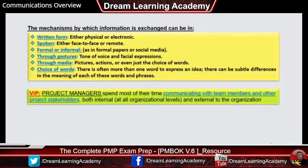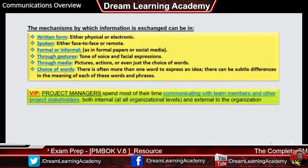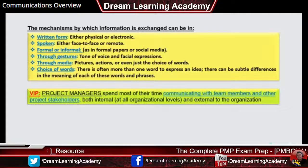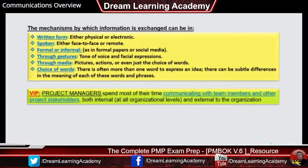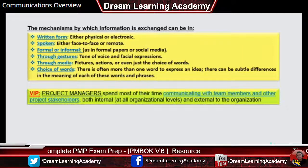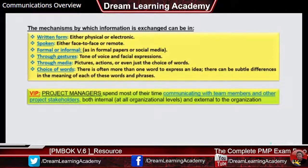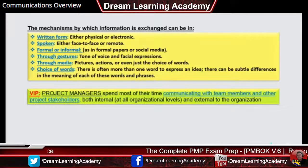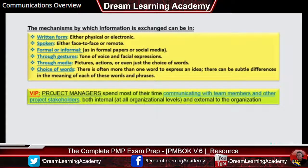Project Communications Management is focused on developing a communications management plan, gathering and distributing project information according to that plan, and checking that communications activities are completed in accordance with the plan. Project communications are absolutely critical for a smooth and successful project. A project manager will spend 90% of his time communicating, with 50% of that time spent communicating with project team members.